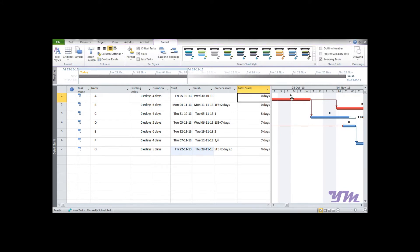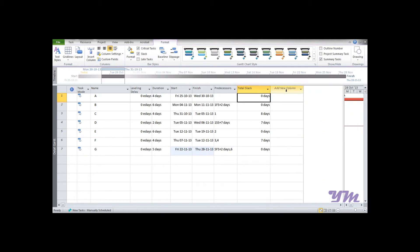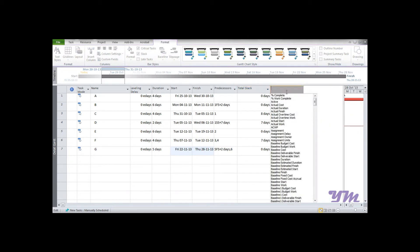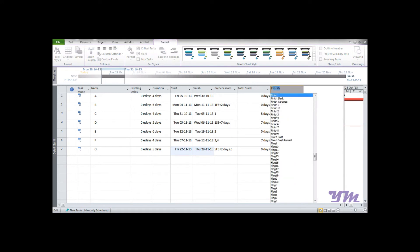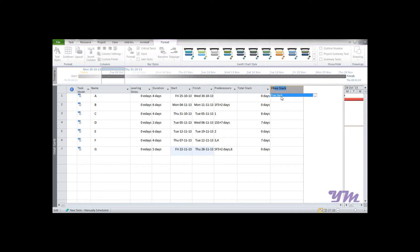As we already know, the bars with the red color are critical, so the slack would be zero. This is how we can get it. Now suppose you want to further add another column known as Free Slack, so 'F' double, and here it is: Free Slack.